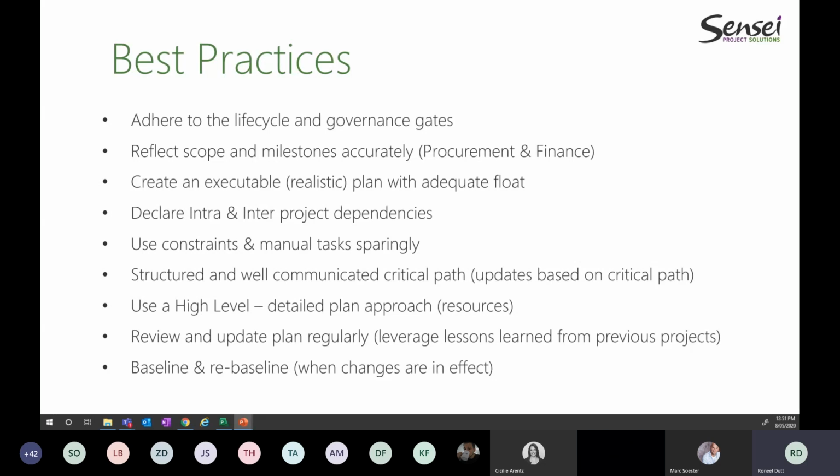As you saw in the plan that I flicked on the screen, a whole host of the generic resources I had were over allocated. And it is good to know when you're in the planning stages of a project or the initiation stages, before you commit to resources or commit to the timelines, that these are the constraints that you're facing. It allows you to do portfolio planning much better.